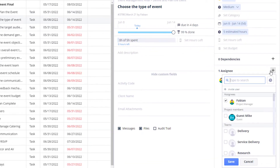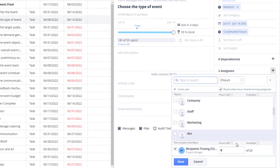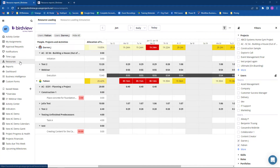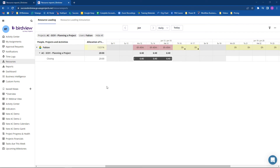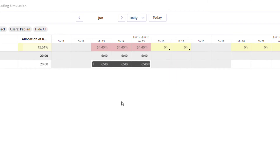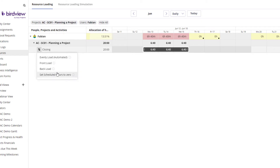Every task requires a certain number of estimated hours. These metrics, when captured, give you greater insight into resource allocation and utilization. The resource loading report offers an interactive heat map of the resources assigned to the project, helping you evaluate if they will be over-allocated or underutilized. If a resource is not available, such as when they're on vacation, this is also highlighted on the specific dates. The resource manager can leverage the hours distribution functionality to front load, back load, or set hours manually.